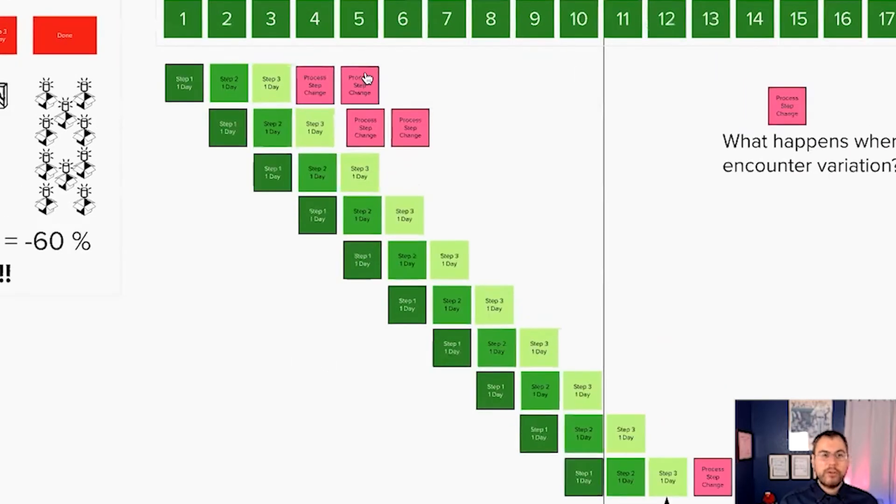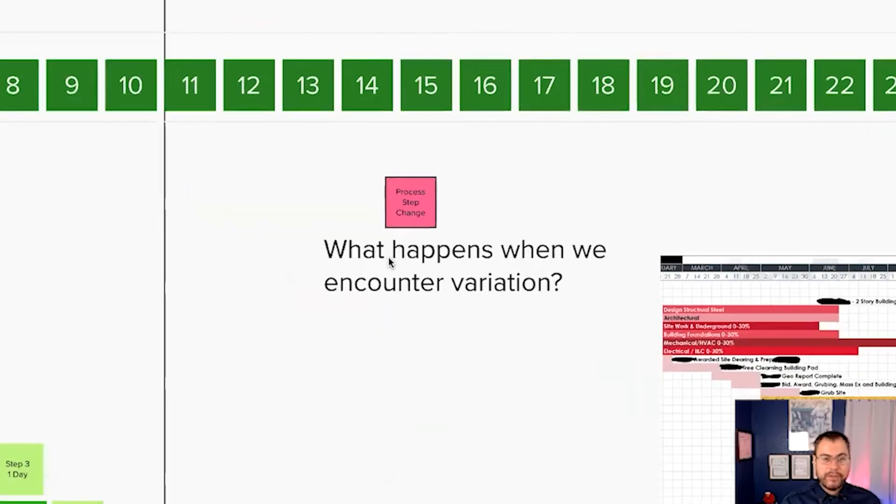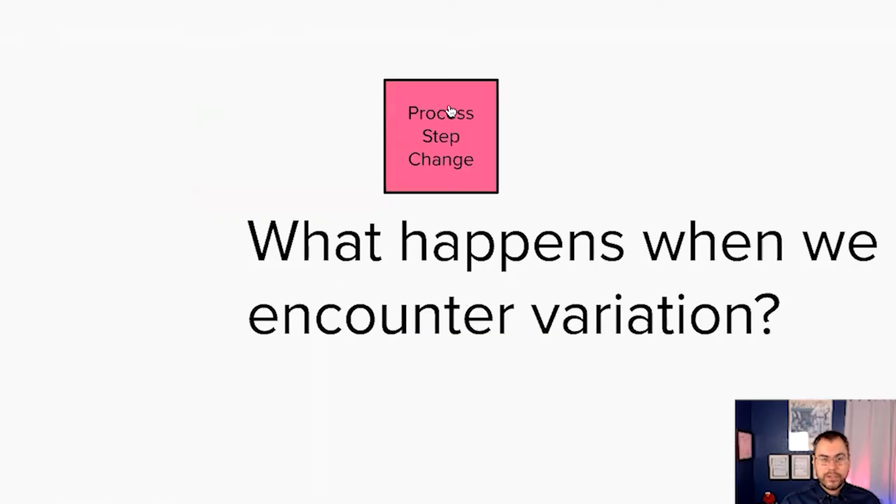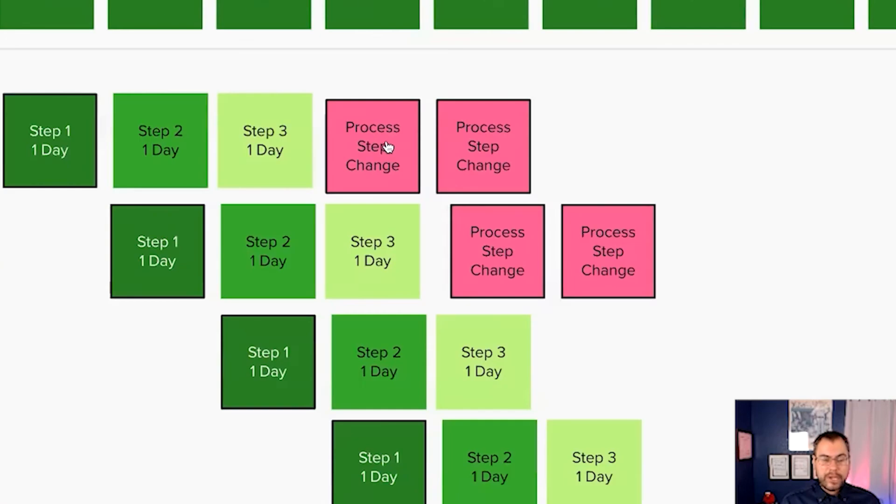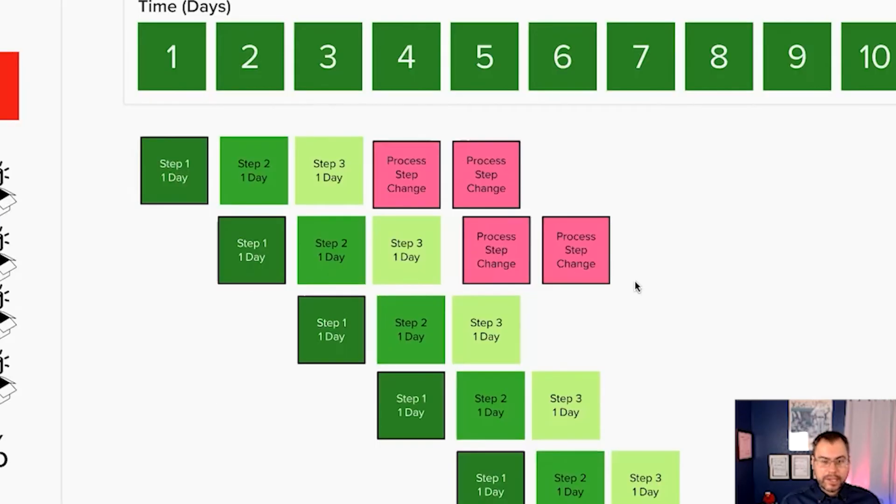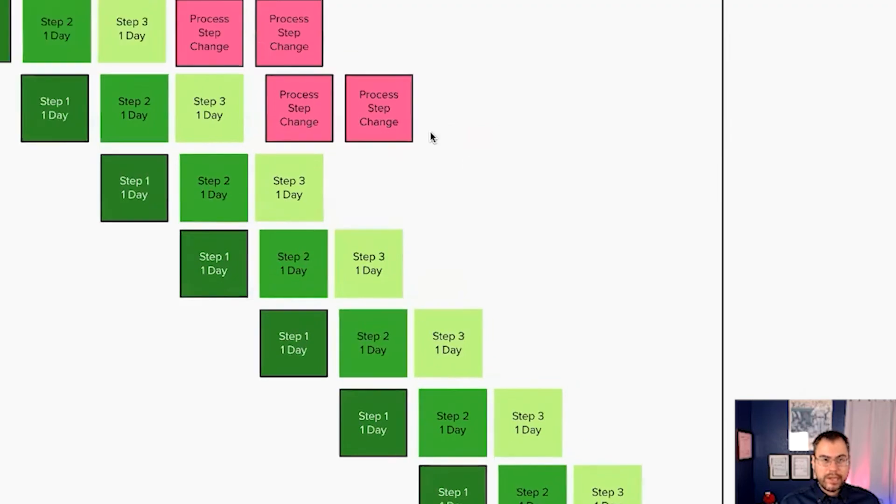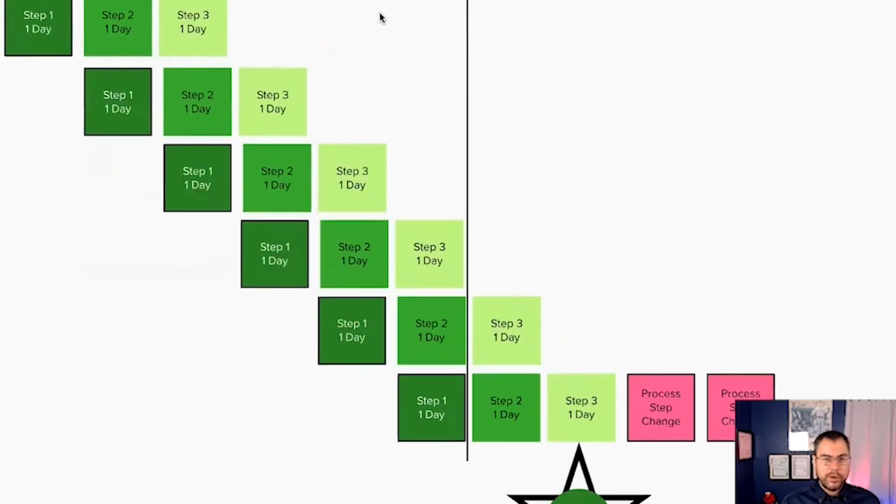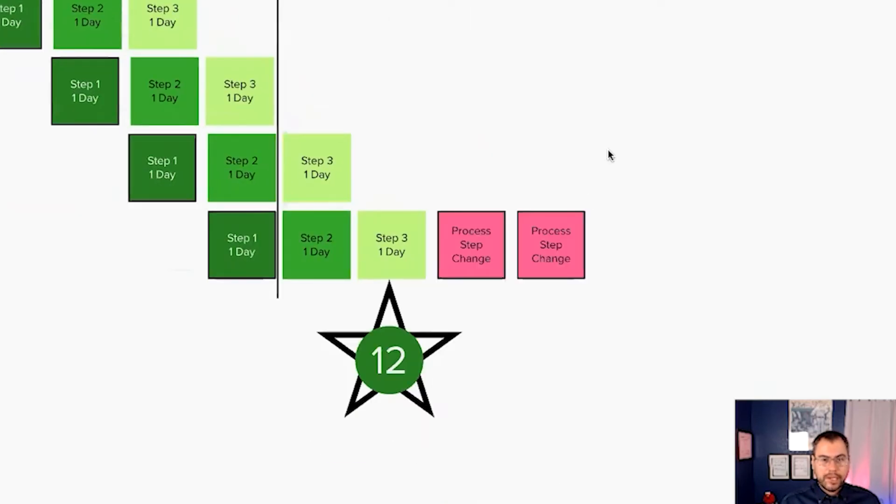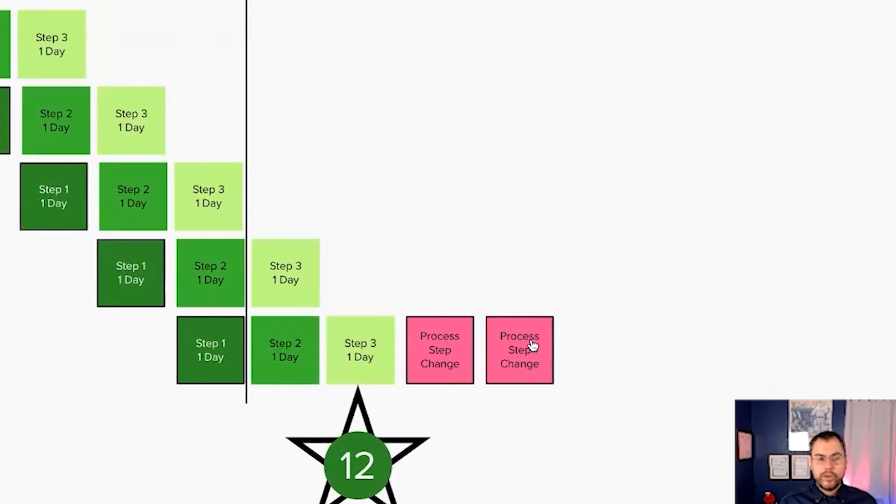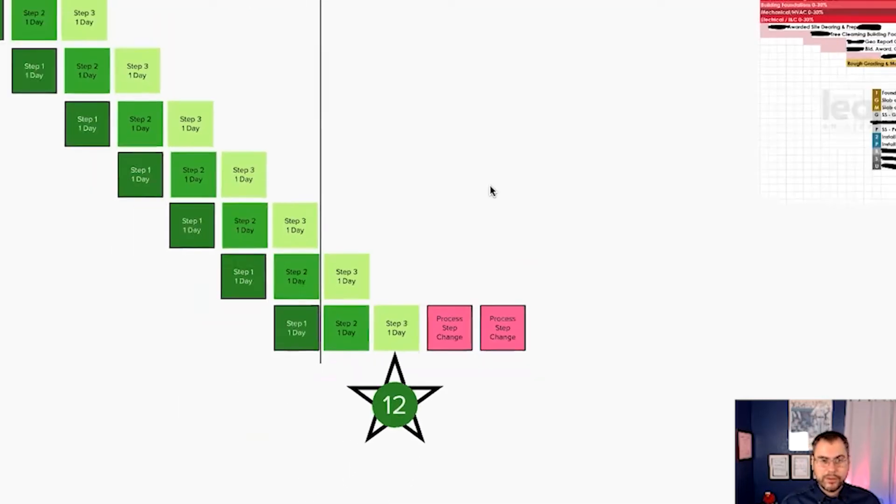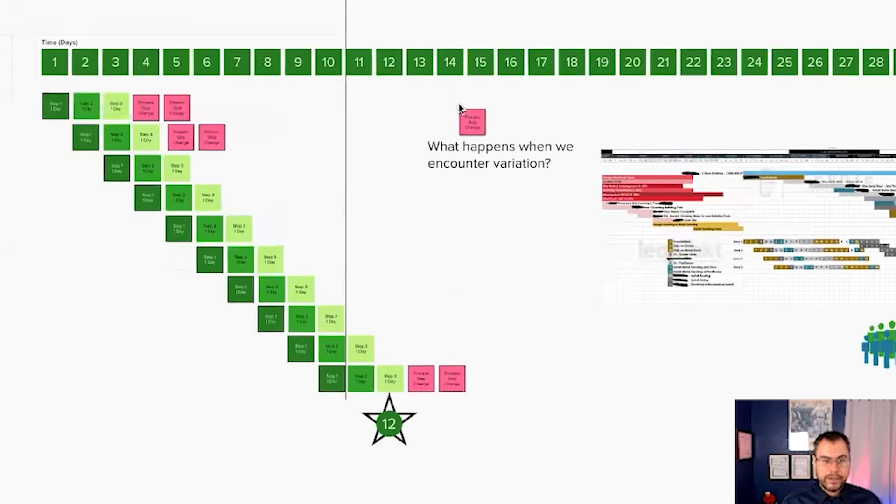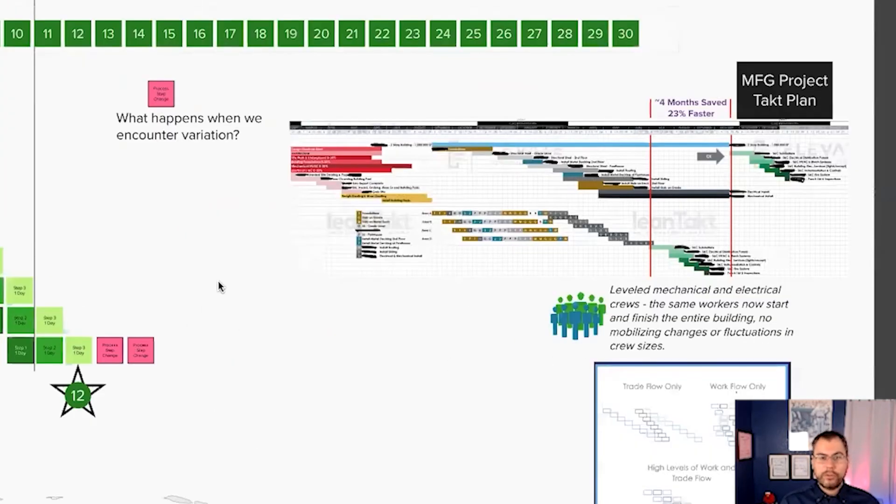Now, what happens if I don't perfectly tack this out and we have some variation or some process step change? No worry. You can make this adjustment. If I add these two days at the end here, if I cascade the two days down across every single row, at the very end, I've only increased the schedule by two more days. Let me zoom back so you can see that it's lining up exactly at the 14 mark. That's a theoretical example.